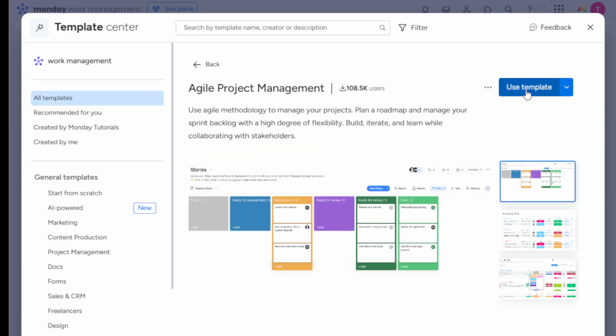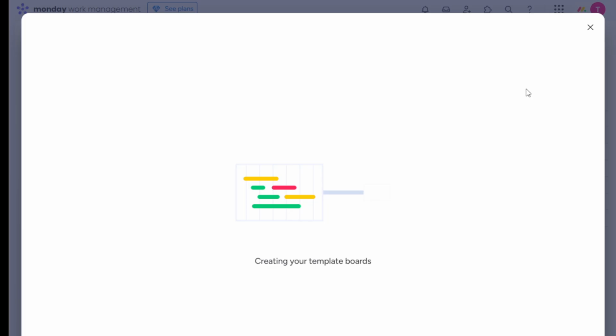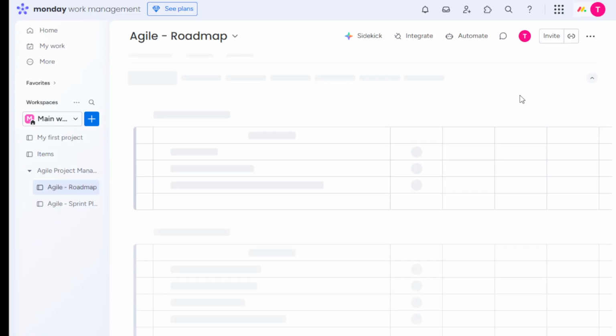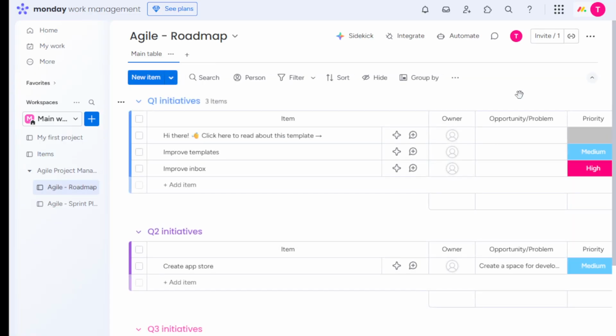Now it's time to assign owners and set deadlines for each task. Having clear ownership over tasks not only enhances accountability, but also ensures clarity in execution. Select each task card on your sprint board and look for the options to assign team members. Don't forget to check everyone's workload to make sure tasks are distributed evenly and no one is overwhelmed. After assigning, set a reasonable deadline. Consider the complexity of the task and the typical pace of your team to set realistic timelines that your team can commit to.